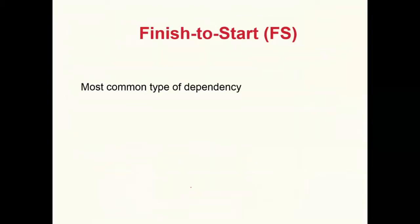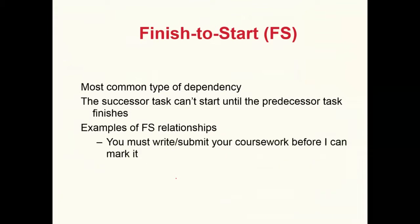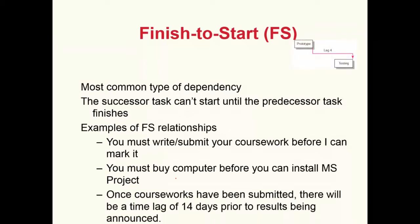Finish-to-start is the most common type of dependency — the successor task cannot start until the predecessor task finishes. Examples include: you must submit your coursework before it can be marked; you must buy the computer before you can install software on it; or once coursework has been submitted there will be a 14-day lag prior to results being announced — so coursework submission is one task followed by announcement of results with a time lag of 14 days.